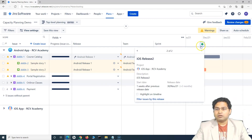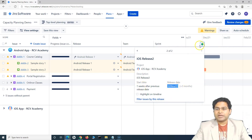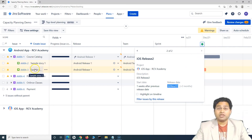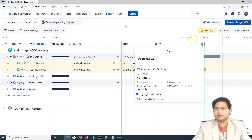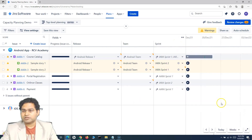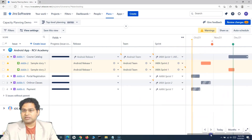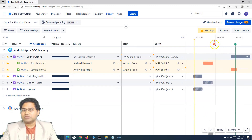That's how you do the planning and add releases in Jira Advanced Roadmap. At the top you will see a green or red icon based on whether the release is on track or not. Based on the release date — say 30th of November, which is two months from now — because there is no delay detected based on the planning done, it is showing as green. I can click 'highlight on timeline' and the timeline highlight appears.